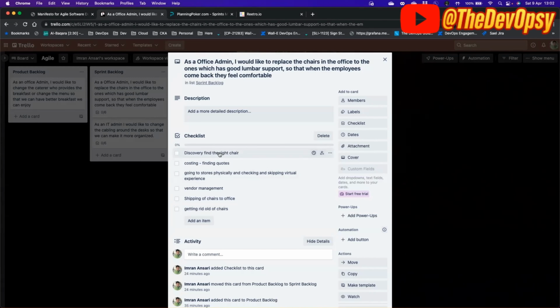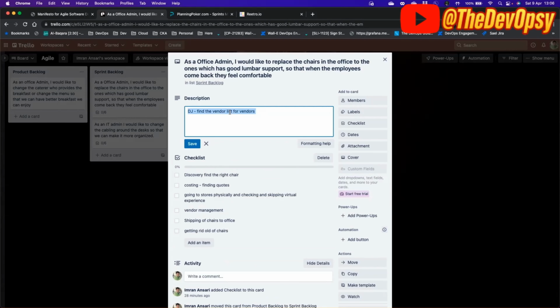When you come into the scrum meeting, you will just say, hey team, everything is going well, today we are here to talk about what you did. What did you do yesterday? What are you planning to do today? And if there are any roadblocks, that's what you would start with. Then others, any individual, will start with his updates. The Scrum Master takes note of roadblocks on his plate, and that's it. He will move ahead. He'll not try solving that problem right now in the Scrum meeting.